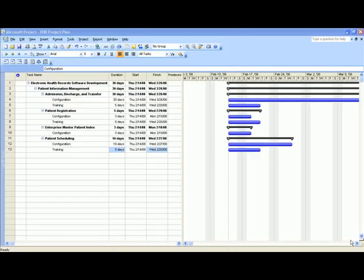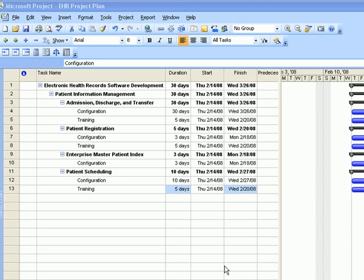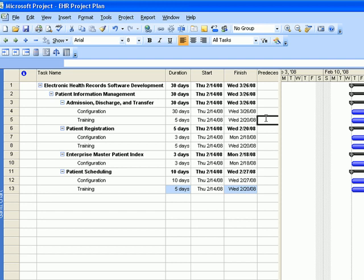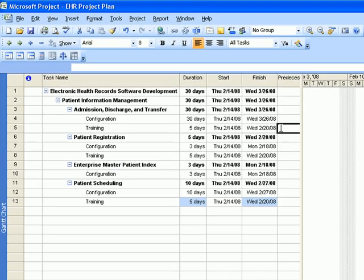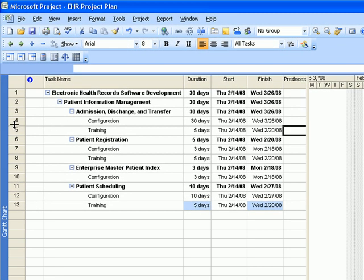The next step is to enter the predecessors. Remember that training comes after configuration, so let's do the training segments first. For the Admission Discharge and Transfer training segment, the predecessor is its configuration segment, which has task ID number 4, so enter 4 for training.